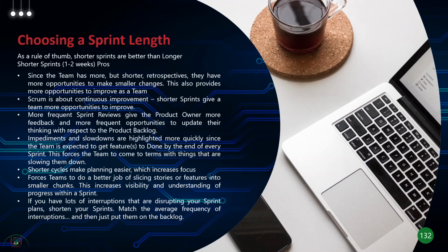And as far as interruptions are concerned, if they're disrupting your sprint, shortening your sprint might help. So if you see that there are interruptions affecting your sprint, shorten it.